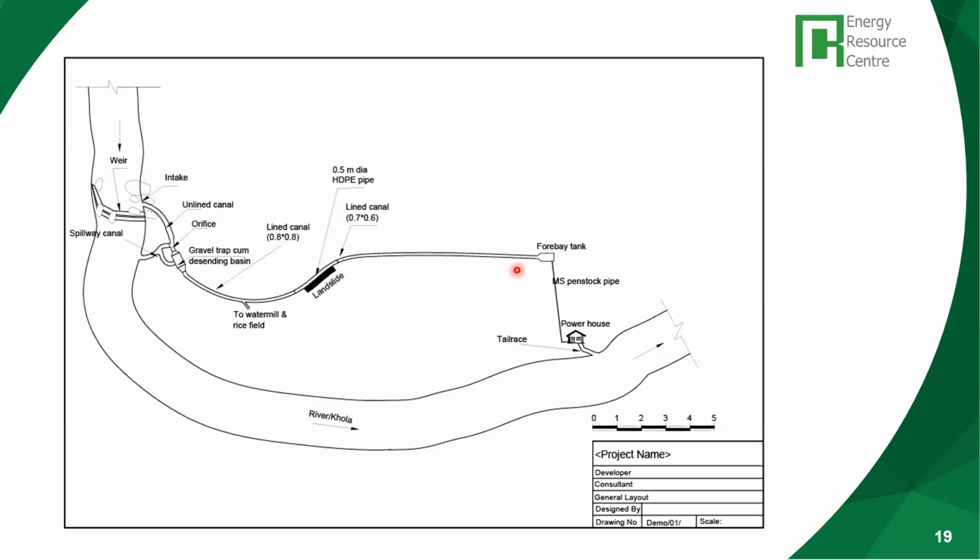Okay, so if you want to do a resettlement or land acquisition plan, then we need a topographical map. The reason I asked about the topographical map was that when you have one, you put this layout on top of it, then you can get the type of land that is affected. In